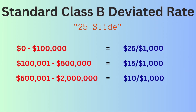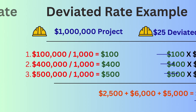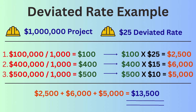Things get more complicated when you have a deviated rate. A deviated rate means that the rate changes based on the project's size — the rate gets smaller as the project gets bigger. A standard $25 class B deviated rate, known in the industry as a '25 slide,' is typically $25 for the first $100,000 of contract value, then $15 for the next $400,000, and then $10 for the next $2 million of contract value.